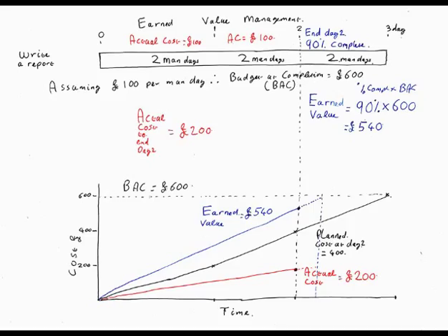No, we're not talking about profit. Don't get confused with value and profit. Because this is all about cost. It's got nothing to do with what you sell it for. If it's a time and materials project, it's rubbish because you're not going to bill the customers much. That's right. So I don't think you can say whether it's good or bad, actually, because you need to know what the context is.